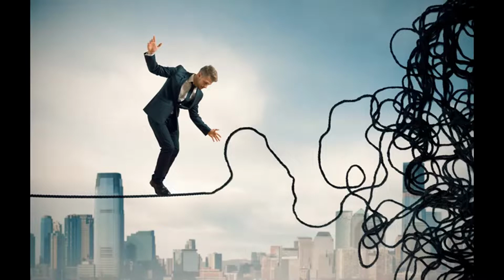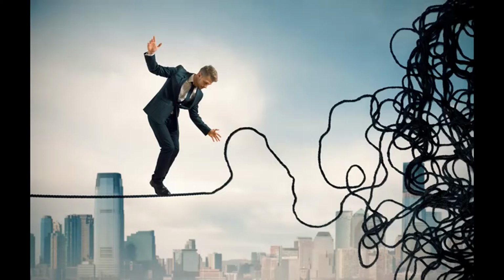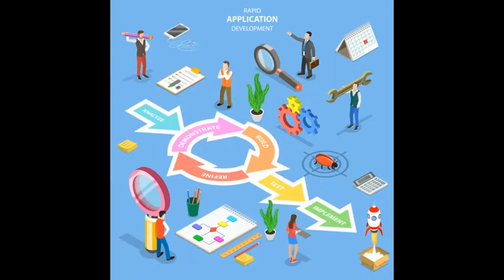When additional risks associated with various staffing alternatives are identified, then one or more of those processes may be revisited. The project manager, risk owner, and project team member all share responsibility for the failure to complete the execution of the risk response. However, even though others share responsibility, the project manager is ultimately responsible, or, in other words, accountable, for the achievement of the project objectives. The project manager can delegate tasks and assignments but cannot delegate the accountability for ensuring that those tasks and assignments are completed.